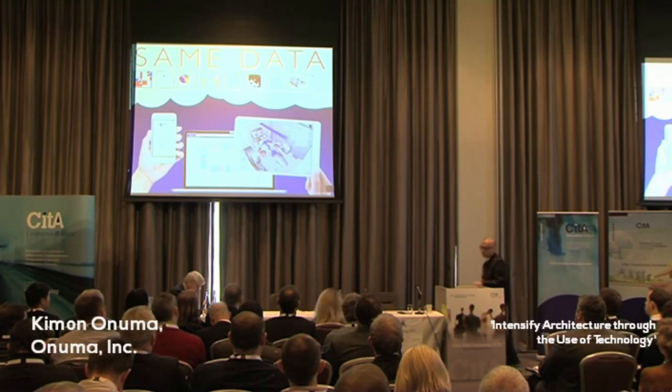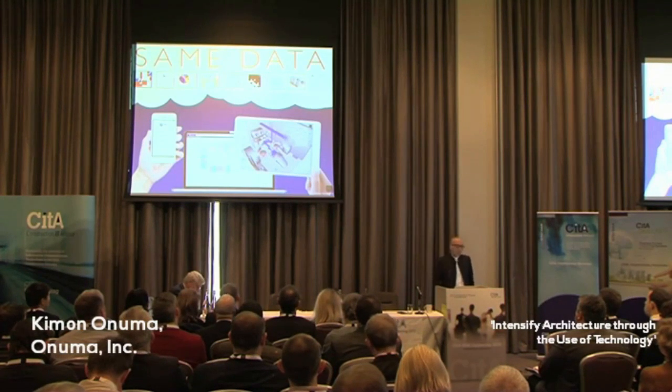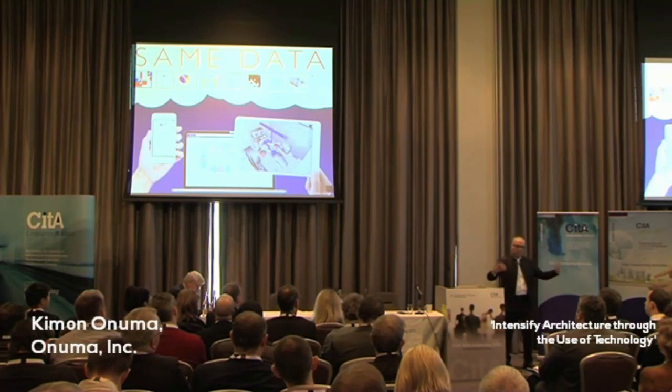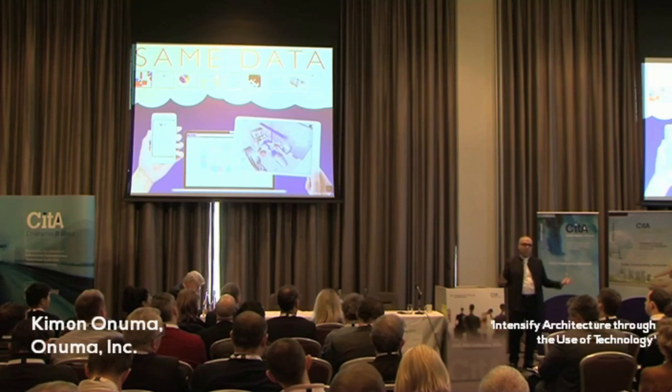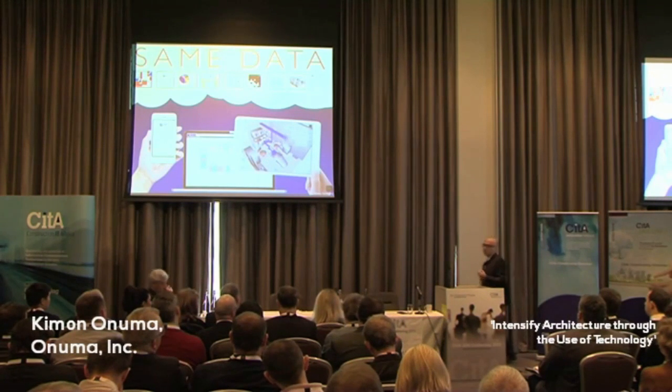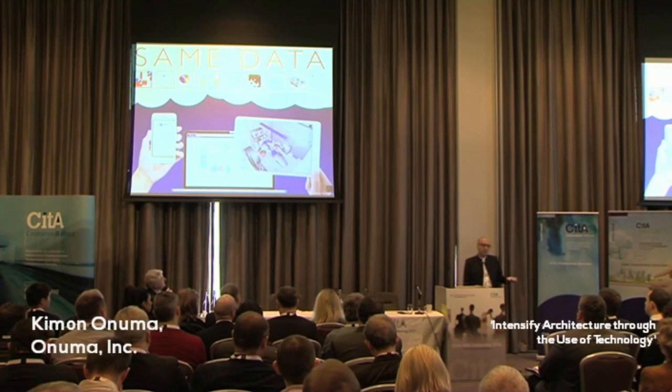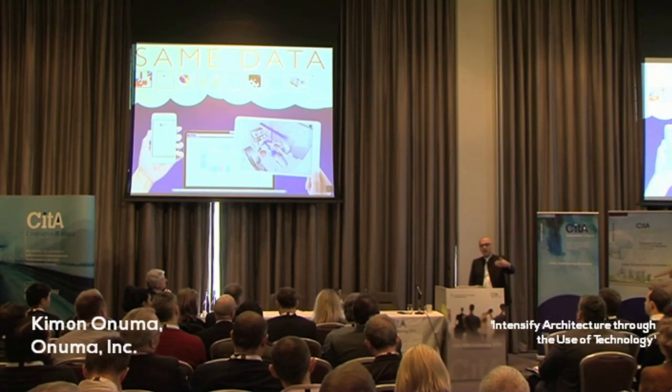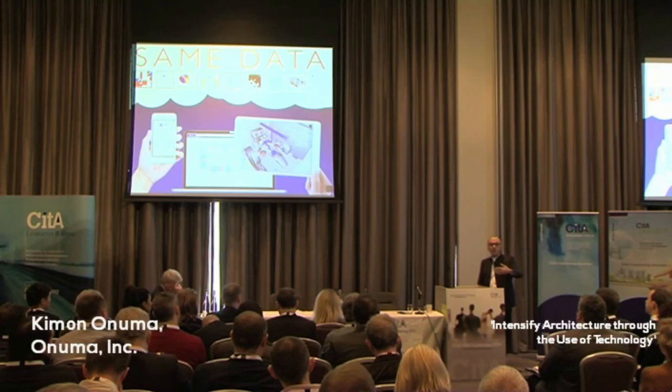And I've seen examples of this over the years, over and over, that we think that a complex BIM, as architects, engineers, builders, we say, okay, the complexity of that BIM is incredibly important for design and construction, but if we hand that whole complexity over to the facility management world, they don't need all that data. And COBie was a big breakthrough, and Bill East is going to be talking later about this as well, but COBie was a huge breakthrough because it identified how you filter out the type of information that's important in facility management. So it's not all the data, it's about how do you simplify the information to give it to the next team that wants to use that data.